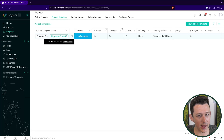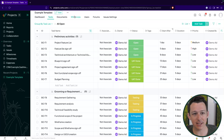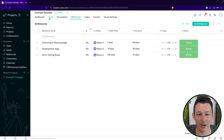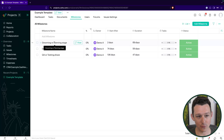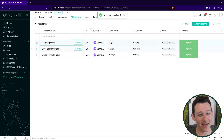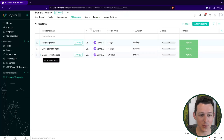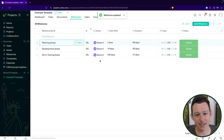Here we'll see the primary list of tasks related to this template. Before we jump into tasks, let me give you an overview of the key objects that make a project template work. At the top of the list are milestones — these are the overarching phases of a project. This template breaks it down into a planning stage, development stage, and QA and testing phase. I'm going to rename each of these to be phases just to keep things simple and consistent.